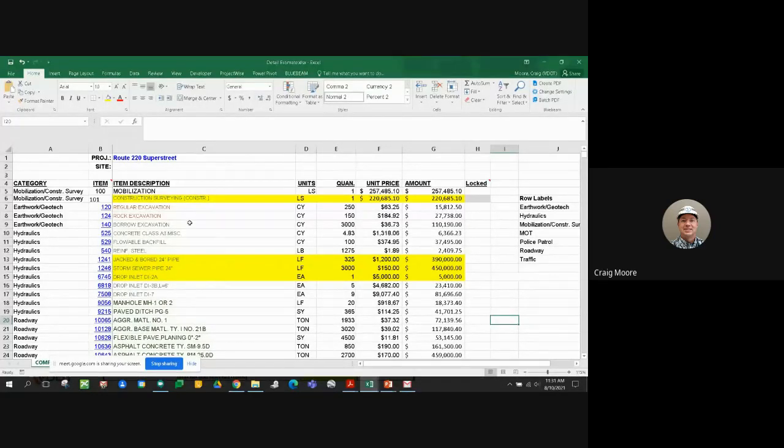spreadsheet. And so trying to assume some quantities of excavation, through Google Earth, VGen data out there, we may be able to come up with some contours, do some site visiting, estimating there. We have what our rock excavation may be. Again, at this stage, these are preliminary numbers based on the information we have available, which in many cases is not a lot of information.